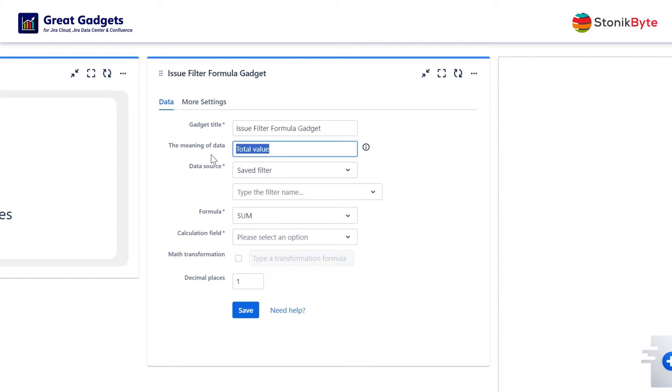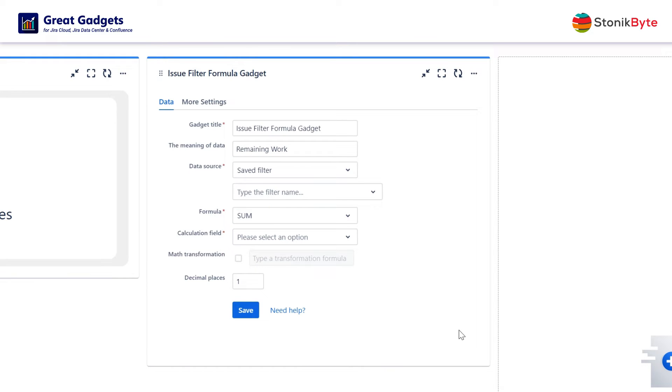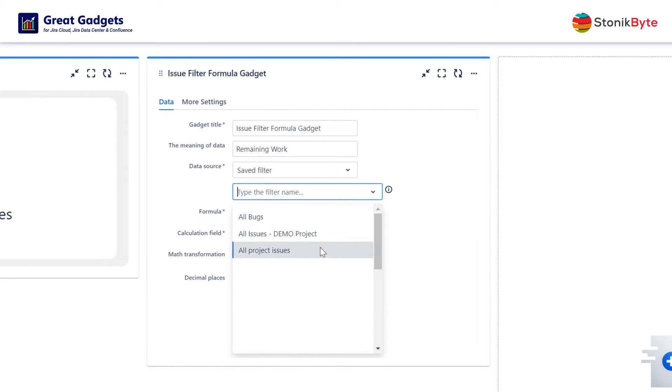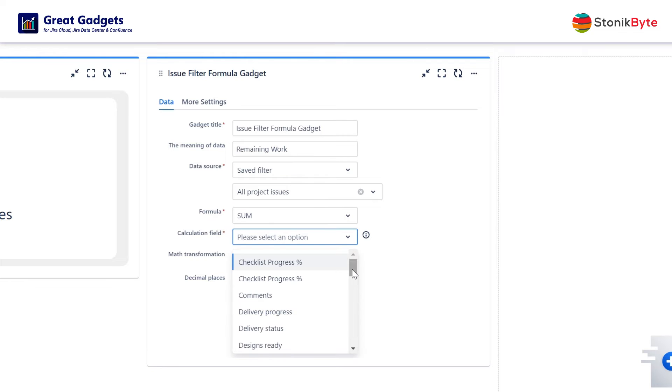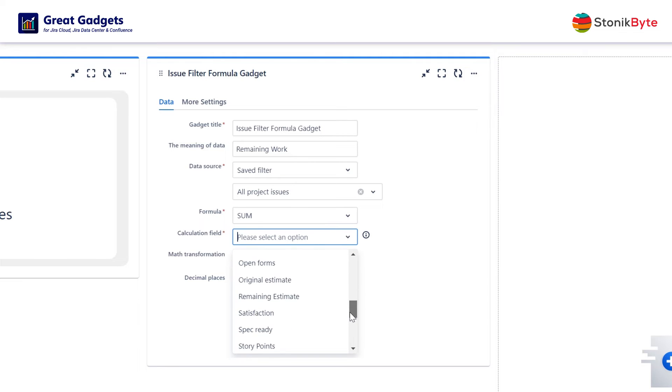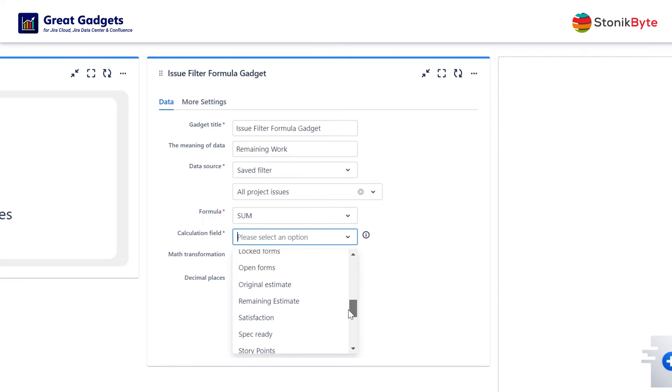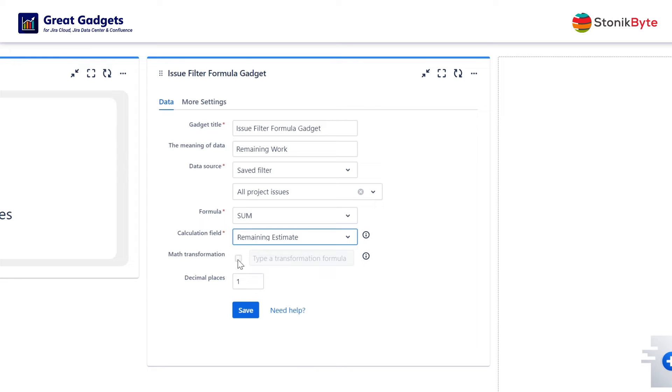Now suppose you want to calculate and display the total amount of work remaining in the project. To do this, configure the gadget to calculate the sum of the estimation field for the filter that returns the remaining issues in your project. As calculation field you can choose story points, time fields, or any other numerical field.